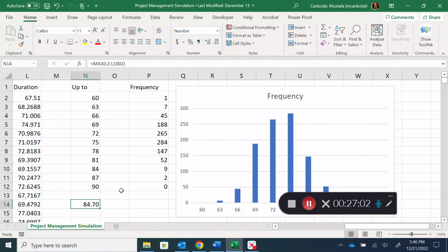So however we're going to determine the project duration in this case, we would maybe just put somewhere around up to 81 or 84 as a possibility as our project duration. We could just maybe leave about a 1% chance and just assume that the project, worst case, may take around, let's say, 87 days or 84 days in that range. That is going to be your own judgment.